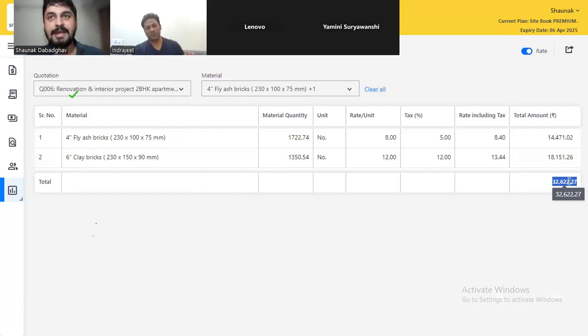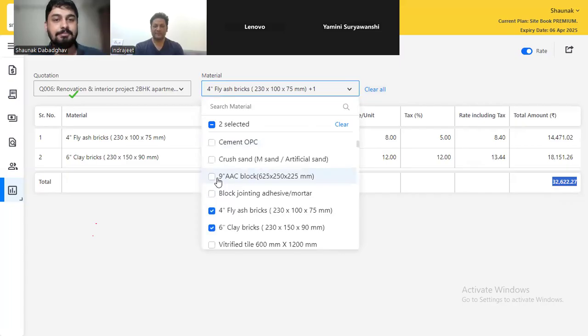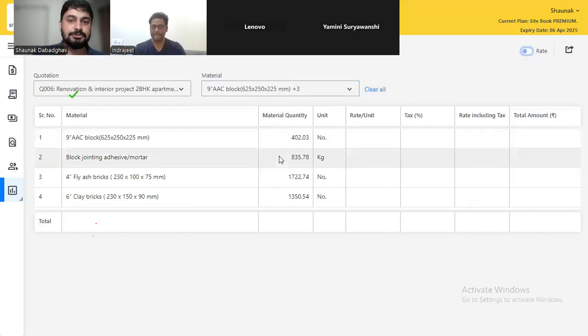We were discussing, so we have a few developers who have taken this, mainly because they liked digital estimation. They started telling their engineers and their site team that whatever quantity is here, you have to raise the requisition for it. That should be the final quantity. One developer told us they are doing cost control in this manner. Site engineers used to put this as the requisition, and then they used to punch it, and it would go for the PO.